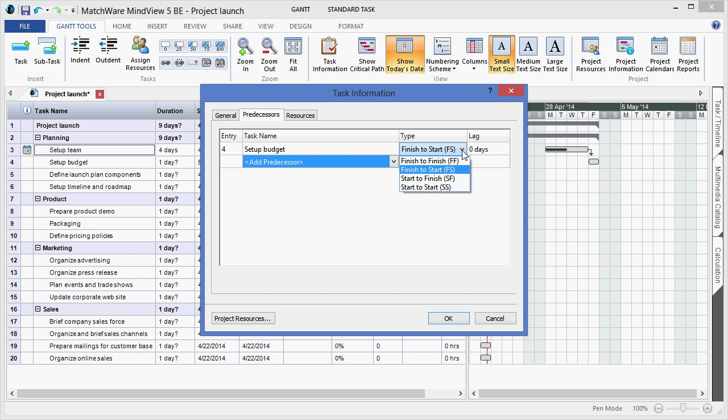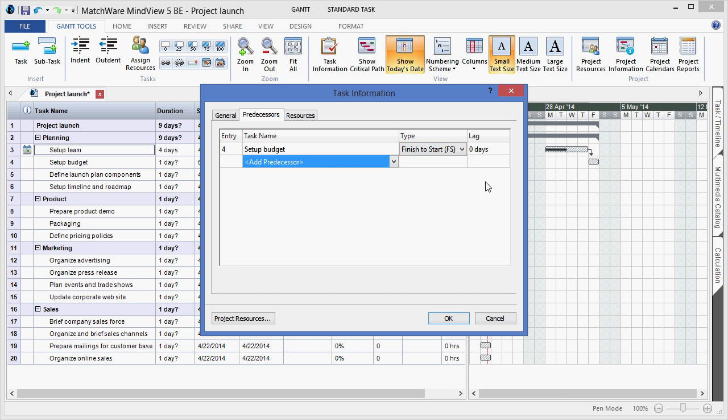Finish to finish, finish to start, start to finish, or start to start. I can even choose to add any corresponding lag time that's necessary.